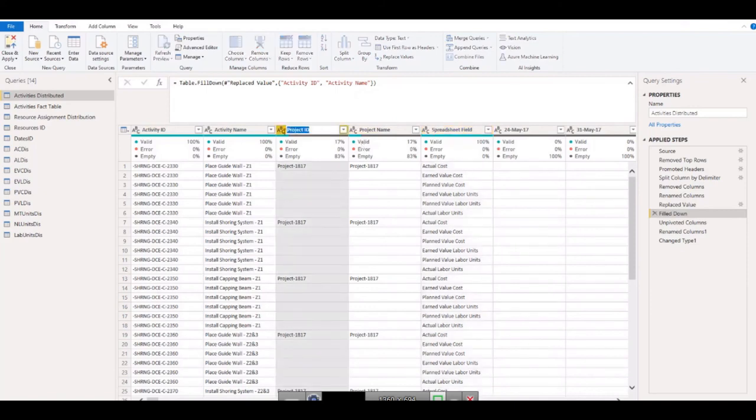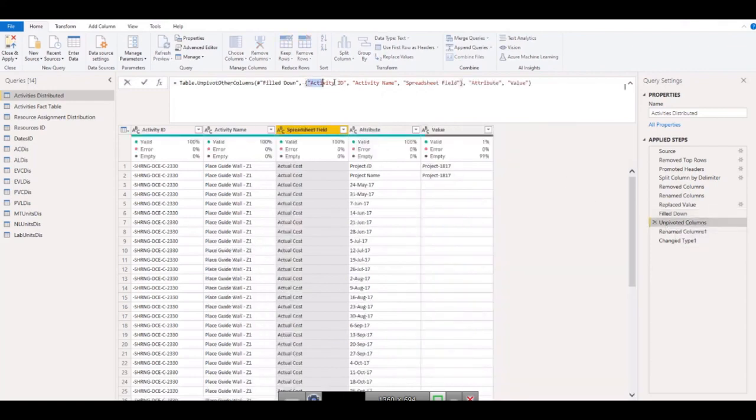So now we need to go, and I will copy this, go into unpivot and add that step. In fact, I will copy from here, put a comma, and paste it in between. Similarly, I will paste it in between, so it is there. First I need to paste project ID. Now I'm saying that either you can do all these steps again by yourself, or you can just change the code here. I'm saying that now include 5 columns, not 3. So project ID, and the other one is project name.